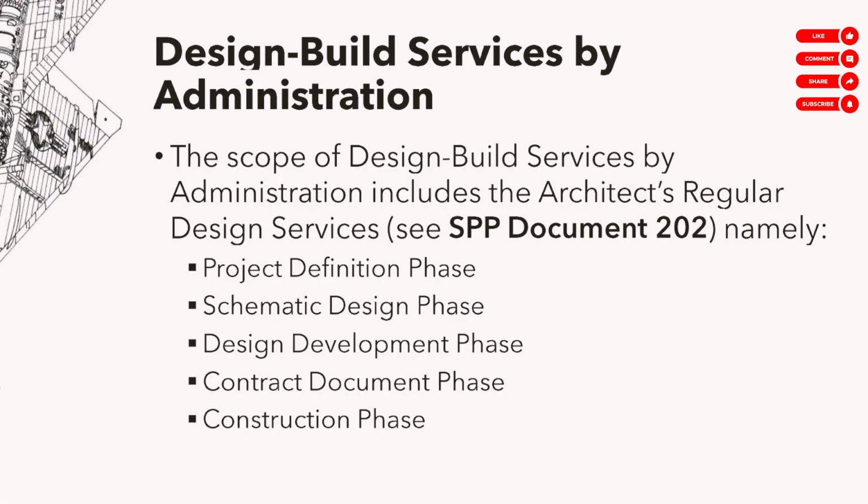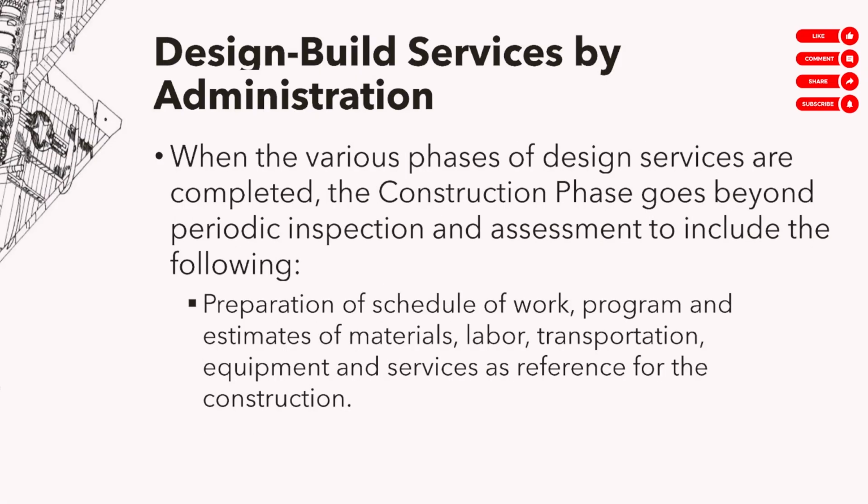Okay? Wala nang bidding dito kasi the purpose of bidding is to find a contractor. And in design build, you don't need a contractor because you are the contractor. So that's why wala nang yung bidding phase. Construction phase again. So you do all of that because you're still the designer after all. But the construction phase is not the same.